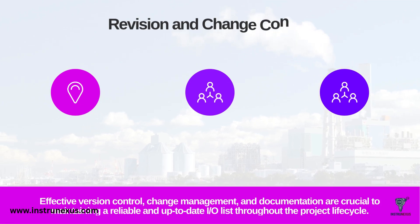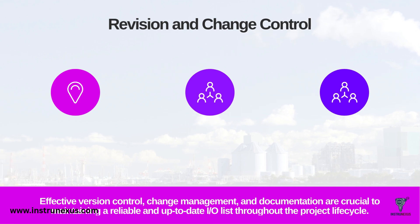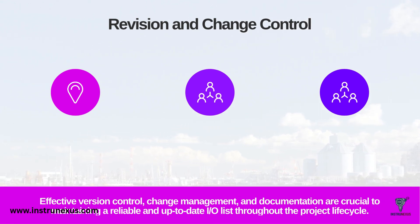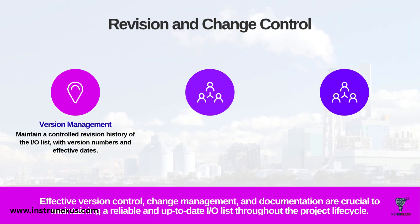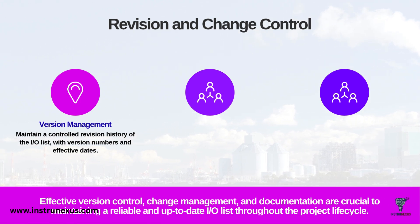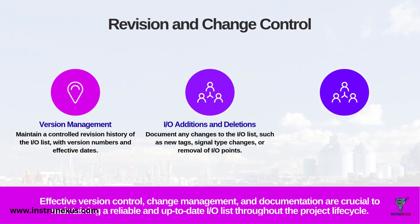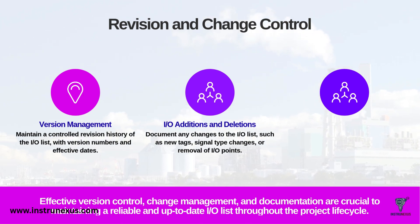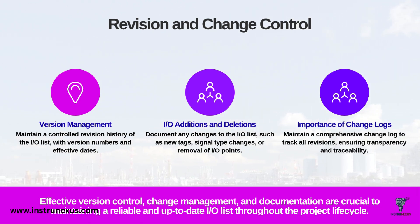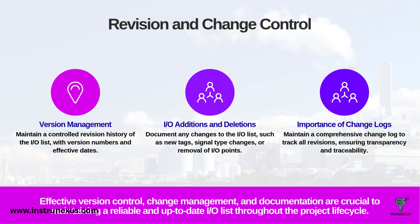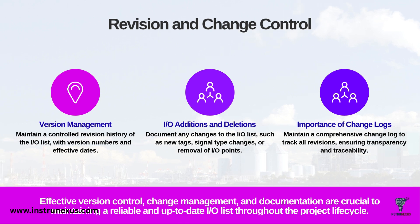Because the IO List is a living document, revision and change control is not just good practice – it's essential. There are three pillars of effective change control. First, version management: maintain a controlled revision history complete with version numbers and effective dates so everyone knows they are working from the latest correct version. Second, IO additions and deletions: as the project evolves, tags will be added, removed or have their signal types changed. Every single change must be formally documented in a change log. This log is vital for transparency and traceability – when a problem arises during commissioning, the change log is the first place you'll look. Effective change control is crucial to maintaining a reliable IO List and a sane project.